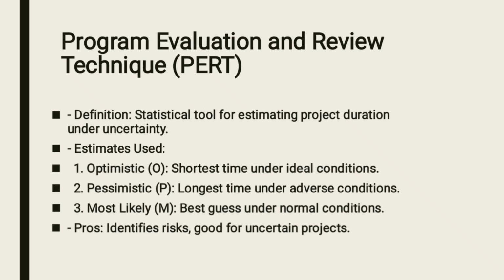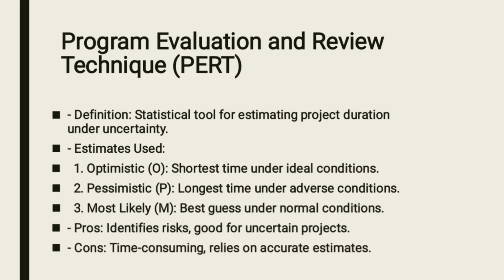The advantage of using this one is that number one, it is able to spot the risks of a project. Number two, it is good for those projects where you are very uncertain on the outcome as well as the progress of that project. The disadvantage is that it is time consuming. And number two, you need to give very accurate data when you want to use program evaluation and review technique.